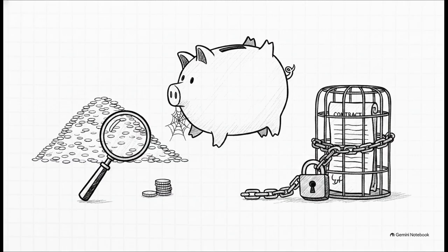And we definitely have to talk about the absolute lifeblood of any project: cash flow. Payment claims are everywhere. Whether it's unpaid work, unfair retention practices, or that incredibly frustrating scenario where amounts have actually been certified but the employer still hasn't cut the check, these claims are entirely about protecting your margins.